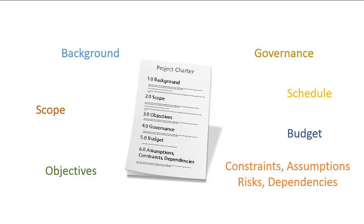And finally, there's dependencies, things that must happen before the deliverables of this project can meet objectives. An example of this could be, perhaps, you're planning the opening night event for a swanky new hotel. Your project would be dependent upon the completion of the hotel's construction.